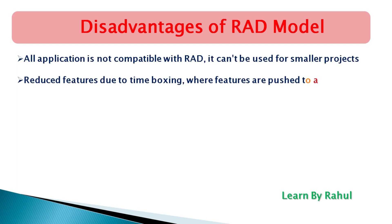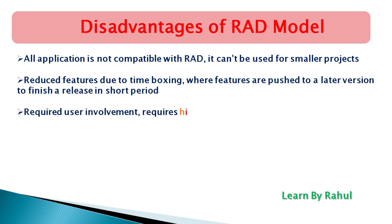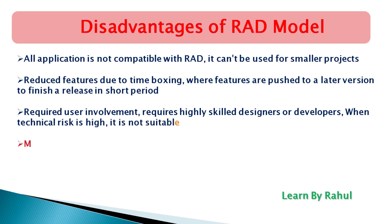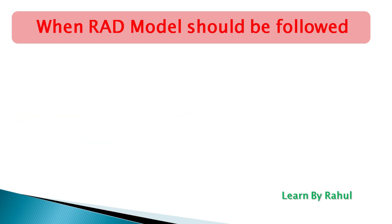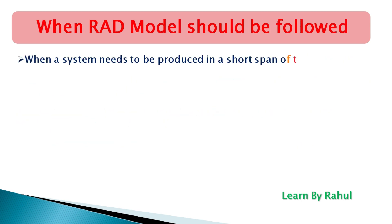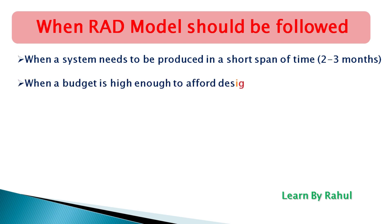Now the disadvantages of RAD model: not all applications are compatible with RAD; it can't be used for smaller projects; features may be reduced due to time-boxing, where features are pushed to a later version to finish a release in a short period; it requires user involvement throughout; it requires highly skilled designers or developers; when technical risk is high it is not suitable; and management complexity is high with a strong dependency on modeling skills.